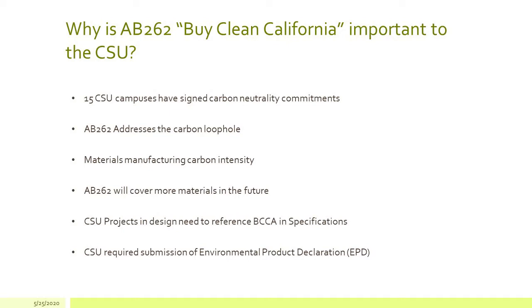So with that, in addition to it being a good idea, and our campuses having voluntarily committed to carbon neutrality, it also is the law, right? The law requires CSU projects that are currently in design to reference the Buy Clean California Act in the specifications, so you set your projects up for success in the future.